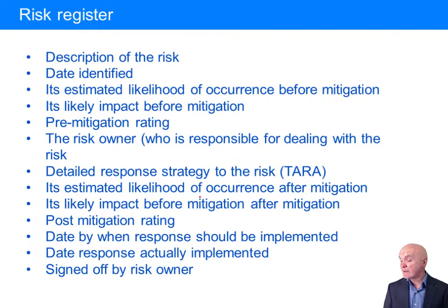This is pretty serious. It's pretty easy to fix. We'll give you 2 weeks to do this. And then we need these people to write in when they did it and to sign it off. And there could even be another column in this for a manager going around and making sure that the risk owner has actually taken appropriate steps to reduce that risk.